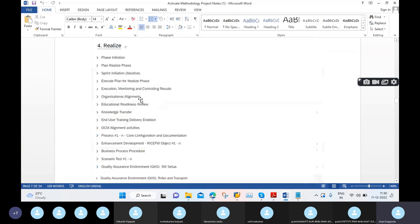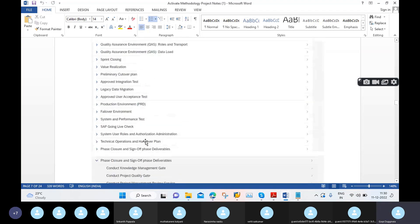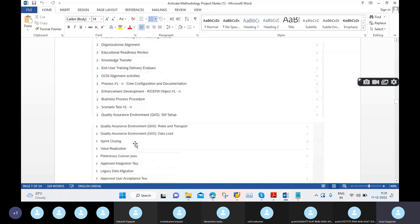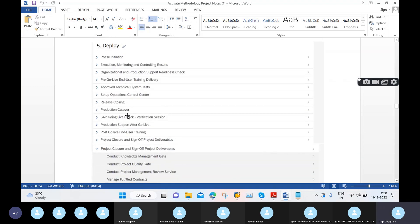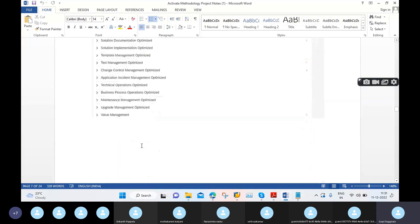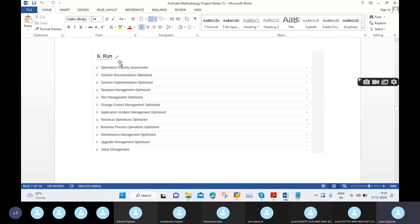In the Realize phase, the build is almost completed and we can start quality testing. In Deploy, we focus on pre-go-live activities, especially the cutover activities, and the system moves to go-live. In the Run phase, after completing post-go-live and hypercare, the support project comes into picture with activities like operations maturity assessment, solution documentation, optimization, and change control management.